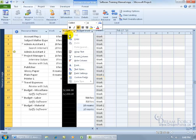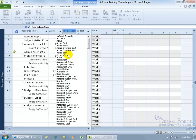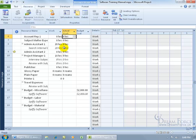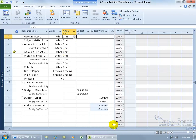You have what you planned in the work field, and then what actually comes in, called your actuals. You actually have an actuals field — right-click and insert a column, and you have 'actual work.' When we assign the admin assistant to 'search internal documentation,' it automatically calculates 20 hours. But when the admin assistant reports back that it took 25 hours, we can enter that in and compare our actuals to the budget.